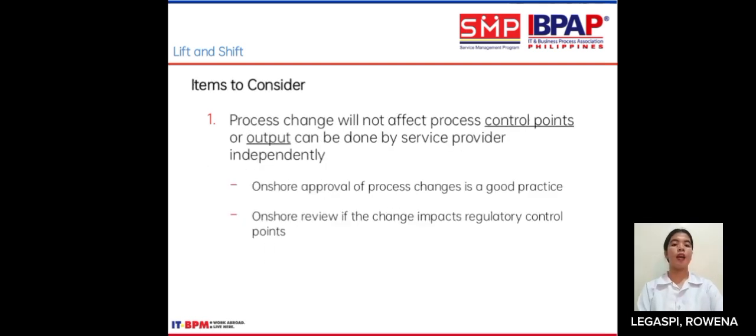Lift and shift. Items to consider. Number 1. Process changes that do not affect process control points of output can be done by the service provider independently. Onshore approval of process changes is a good practice. Onshore review is needed if the change impacts regulatory control points.